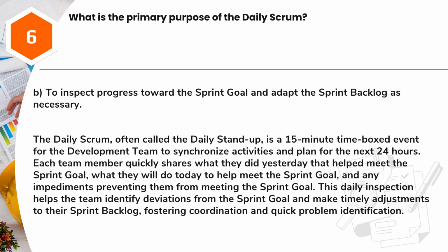Answer: B. To inspect progress toward the sprint goal and adapt the sprint backlog as necessary. The Daily Scrum, often called the Daily Stand-Up, is a 15-minute time-boxed event for the development team to synchronize activities and plan for the next 24 hours.